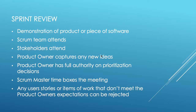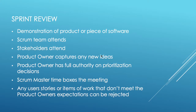One of the key things is that any user stories the team has been working on that have passed the definition of done — which is essentially a quality standards document the team has created to say that any work must meet a certain quality standard. It might contain quality aspects like TDD or certain ways of working. So it's just a quality standards document.